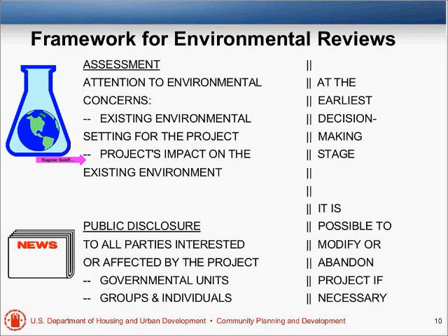Will I be generating traffic? Will I be generating stormwater that will exacerbate flooding? You look at all that, and you do it at the earliest decision-making stage so that it's possible to do something about it. You can modify or maybe even abandon the project. Those sites we could work with. We could find a solution. We just identify the problem, and we figure out a way to fix it.